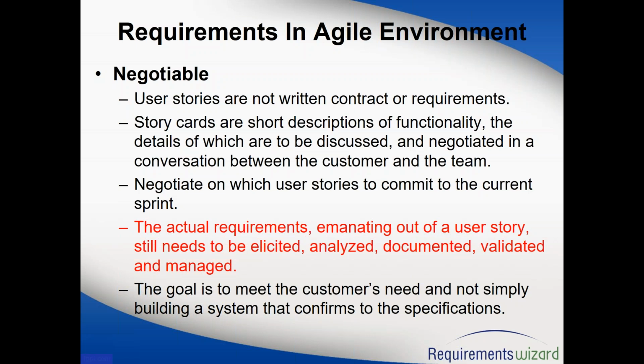Right. In the sprint planning meeting, the team will take a look at the story and they will say, okay, this is what the estimate is. And that is done in story points. We'll talk tomorrow. But there is some sort of estimation done to understand the complexity of the work. So if your product owner is saying, okay, I want 6 stories to be done in iteration 1, and if your team thinks that it's too much work for them, it has to be negotiated. You can say that, out of 6, we can do 3 or 4. The remaining 2 can be done in iteration 2 or sprint 2. So you can negotiate with your product owner and come to a common ground, basically.